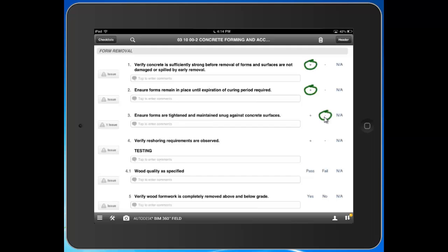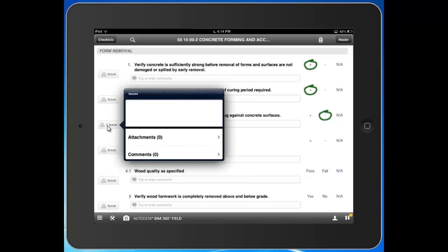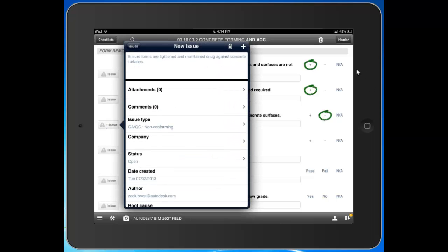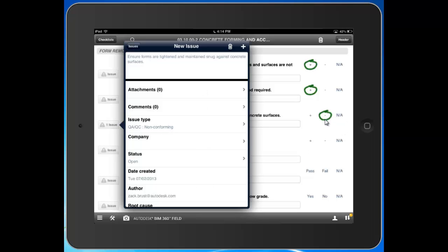Right when I select minus, notice what happened - it created an issue. From a deficiency logged in my checklist, an issue is generated. I can then assign it out, track it through completion, and ensure that something proactively observed gets corrected before you proceed with your work.